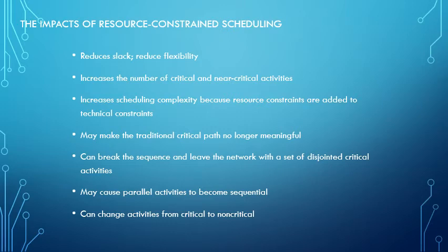It increases the number of critical and near critical activities because you've taken that slack out of the system. Everything is condensed. Increases scheduling complexity because resource constraints are added to the technical constraints.